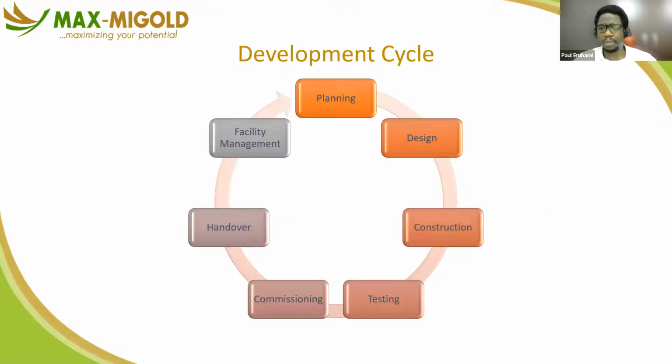We'll have employment of ad hoc staff, lead times to acquire staff, we have procurement processes, HR processes, communication plans, and all of those processes to deliver on the project. So the project plan is a robust document that helps you interpret the drawings, the bill of quantities, and the contract, and then you create a proper plan that includes multiple plans integrated into a master plan for the project. You use that to implement the project.